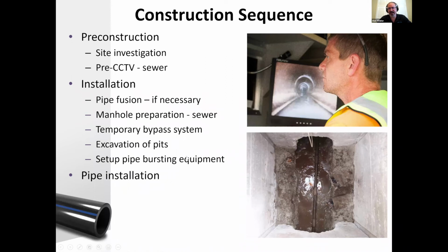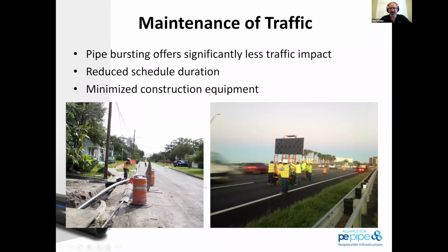Matt Timberlake is absolutely correct, especially on larger diameter projects. The temporary bypass system sometimes is significantly more complex than the actual bursting operation in and of itself. And then we get down to that pipe installation that becomes so quick in comparison to how many other things you're doing.